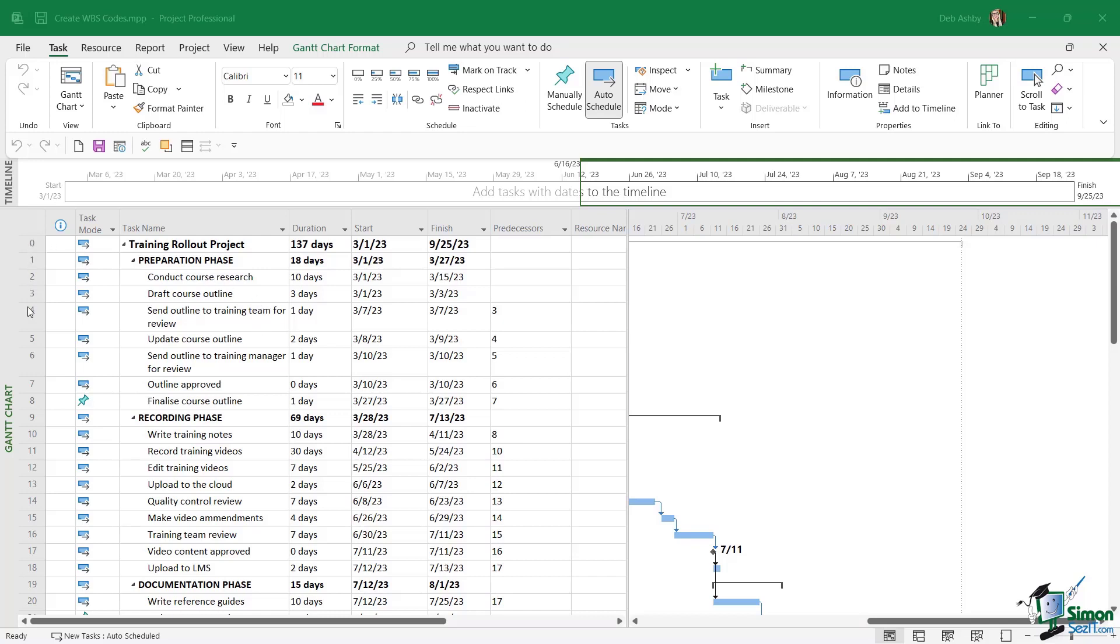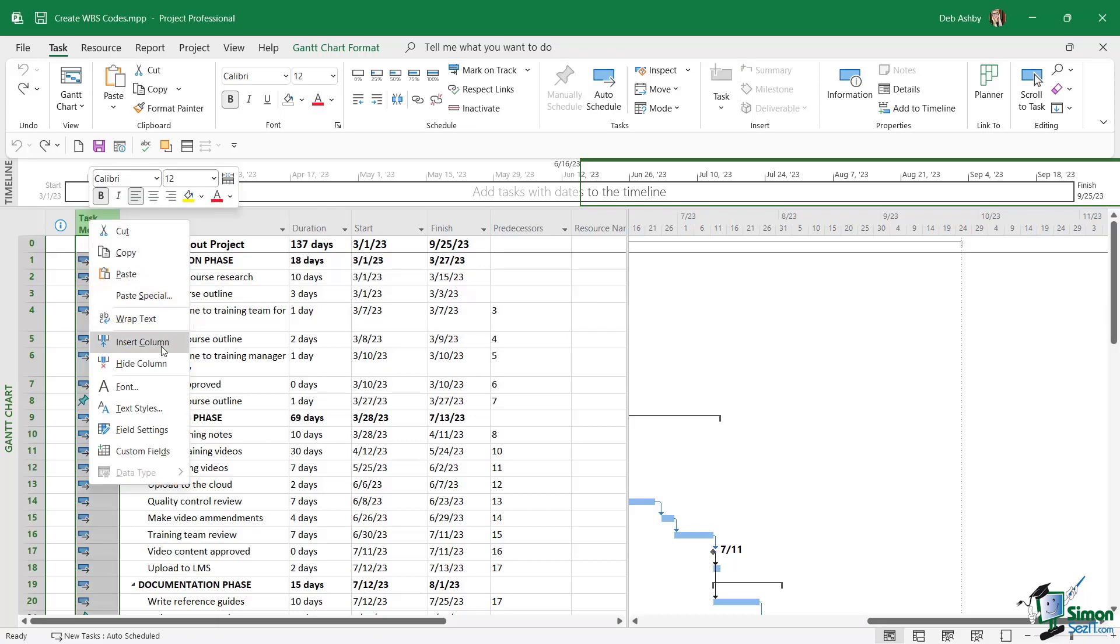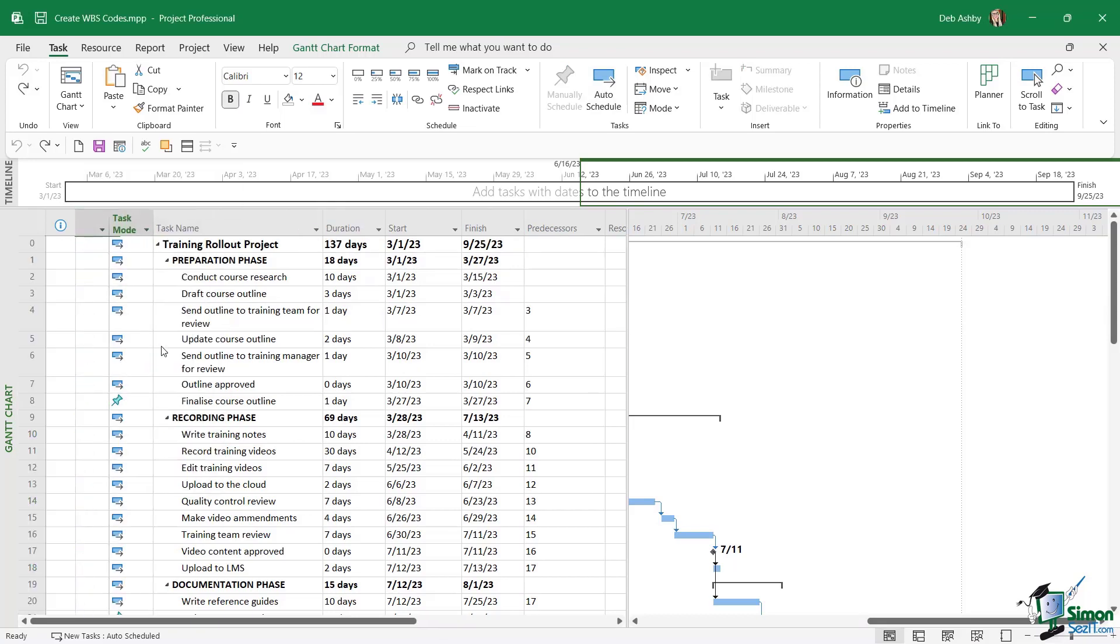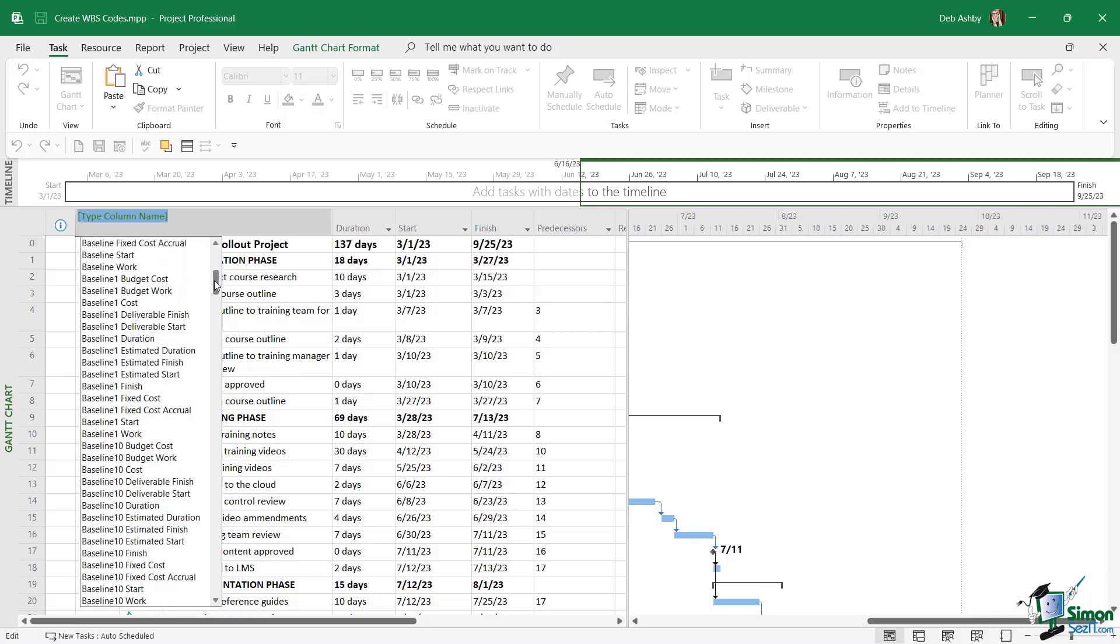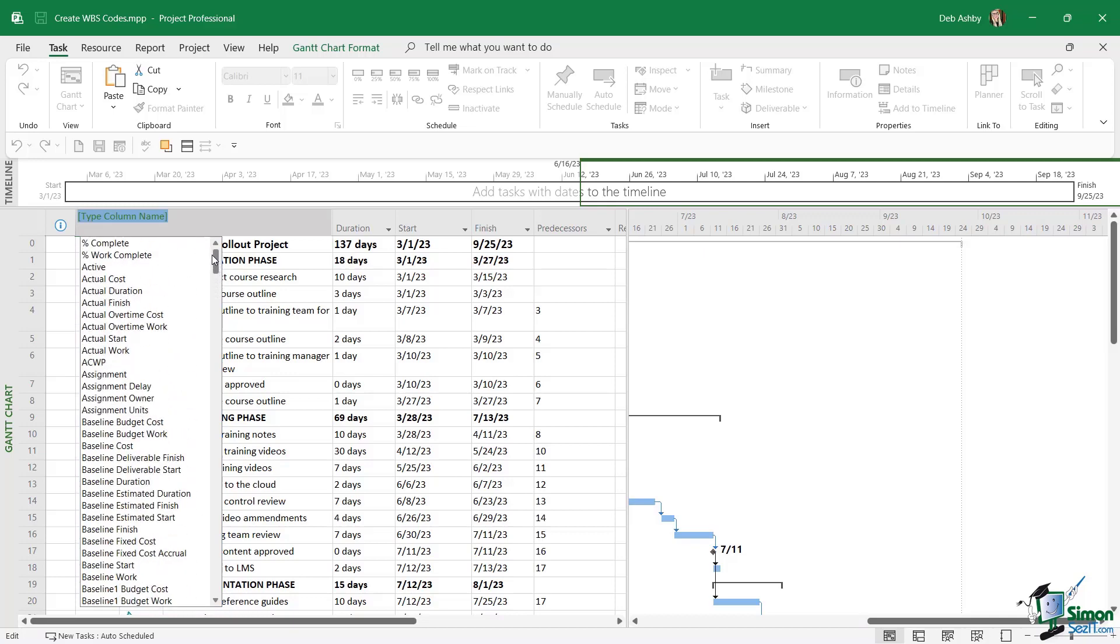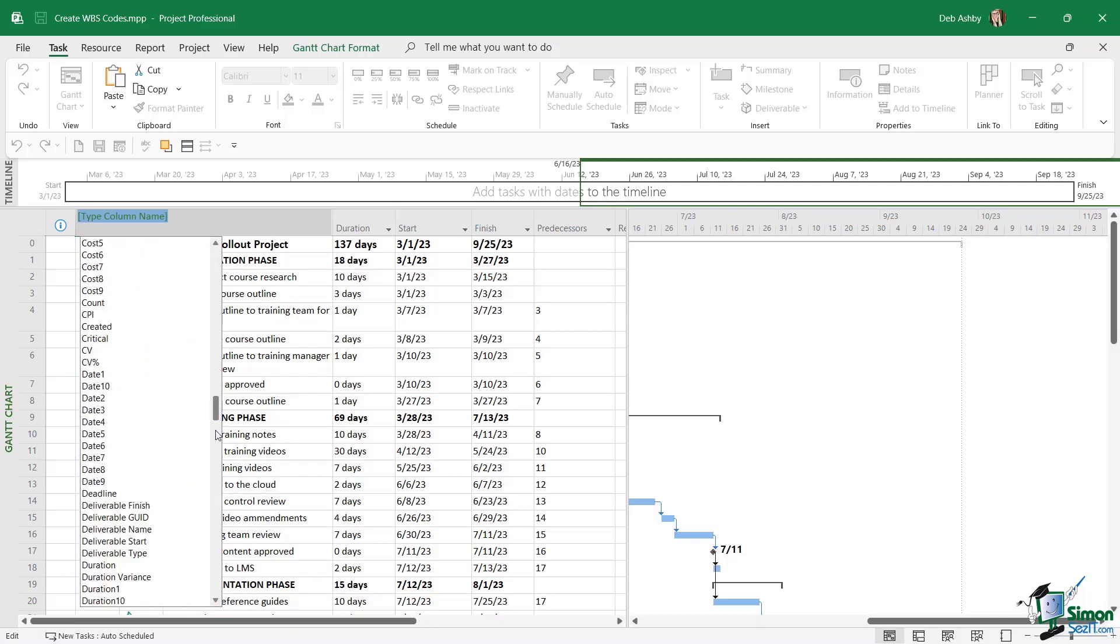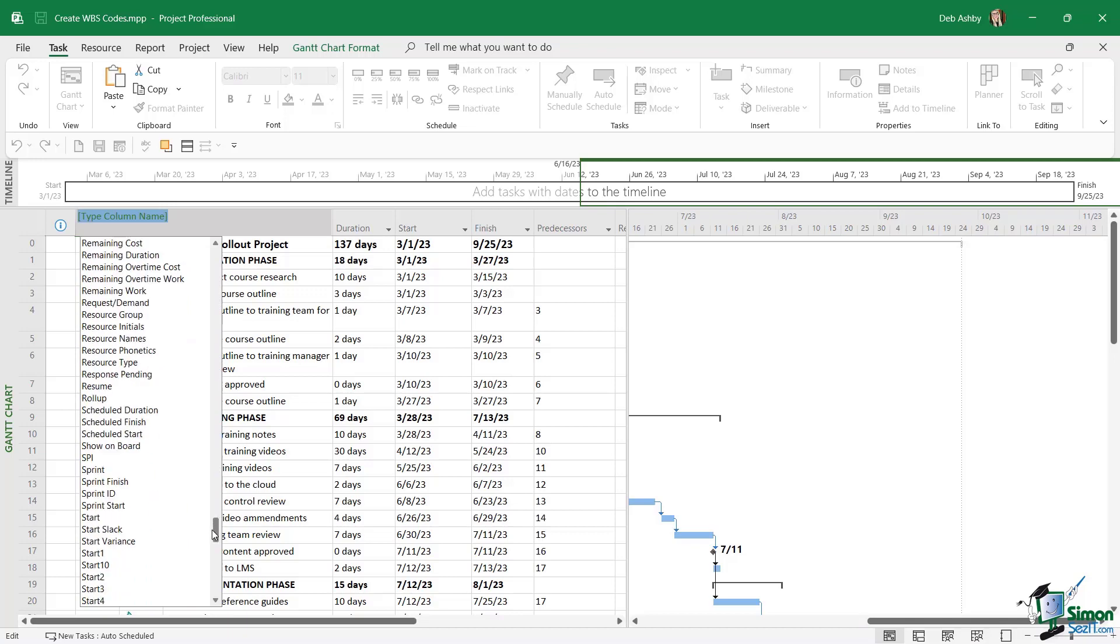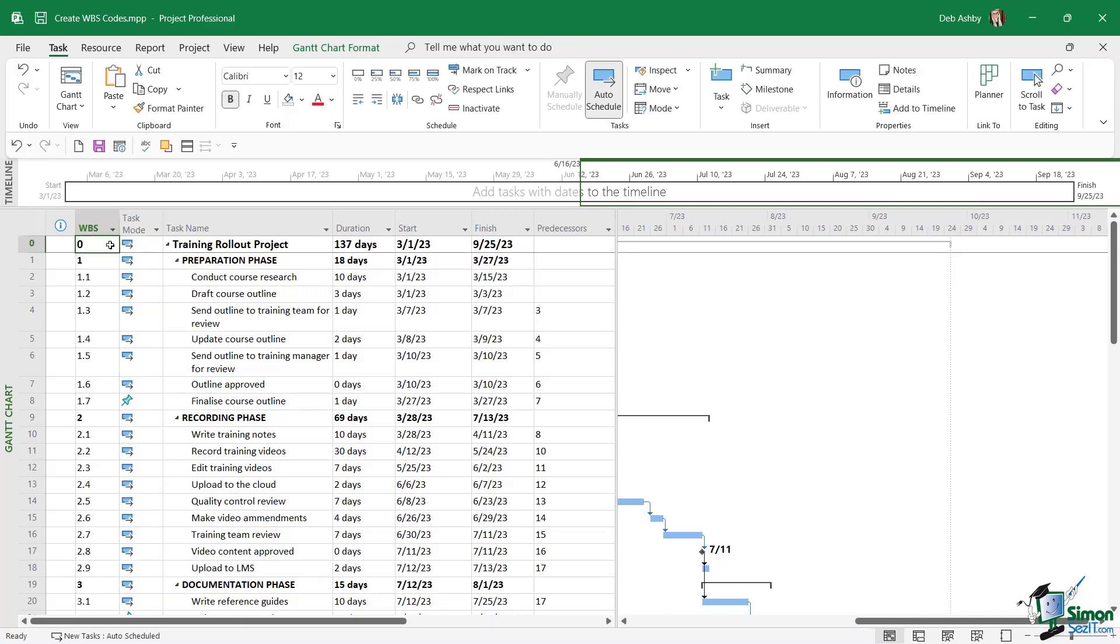So don't make the mistake of thinking that the task ID is the unique identifier. This is effectively just the row number or the task number. So let's insert a WBS column. So I'm going to right click on task mode and we're going to go to insert column, and this is where we can choose the type of column that we're inserting. So I'm going to scroll all the way down because these are in alphabetical order and we should have one for WBS. And there it is. Now notice as soon as I add this column it's giving me its default WBS numbering.